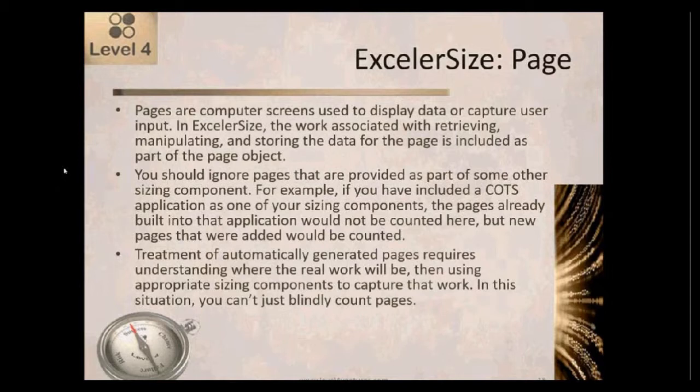For example, if someone is going to enter data onto a page, and then based on that data, some PHP code is going to go off, parse the data, and generate a bunch of pages that get output to a website, then if you look at all the combinations of data, there might be 1,000 pages that could potentially be generated from that process.